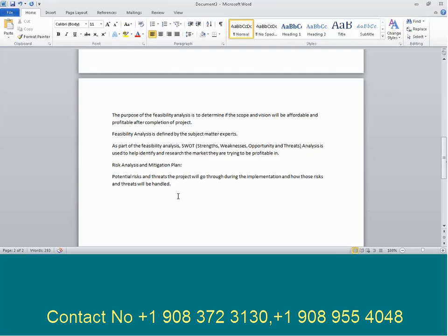Okay. Now, next one. So once they decide that the project is feasible, once they define the project scope, once they define the feasibility, and also are done with the risk analysis, and if they figure out that fine, this is really worth it, then the next step is estimating the budget. Fine, we have identified these are the different processes that need to be automated, but the question is, how much money is required to implement this solution? Now here, the technology team will jump into the picture.